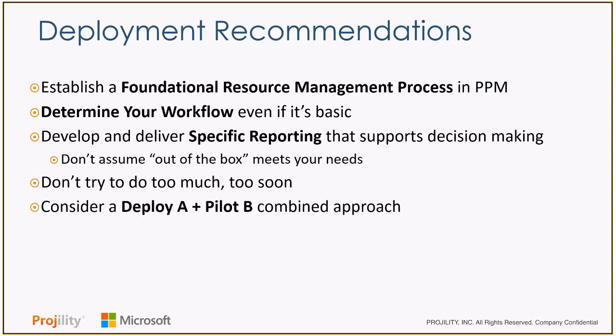And we also recommend you consider doing this in a dual approach. Deploy what you need, but also pilot what you want. So I need to have project requests coming in for different roles. I need to have schedules built with resources. I need to track time. That's great. But I also want to look out 18 months and do next year's resource forecasting and planning. Maybe deploy A, that first set, but pilot B as it relates to A, and tie these two processes together so they're all part of a common approach.